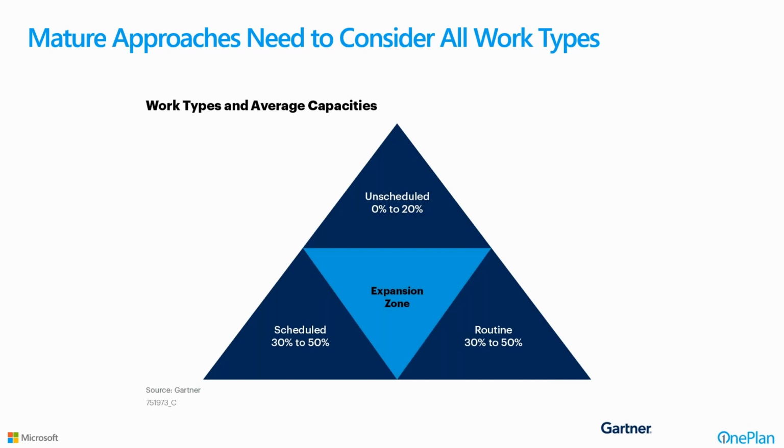And then there's the unplanned, the unscheduled, the things that come up that may be project or non-project related. These could all come together to take 100% of my bandwidth. And if I assume that I'm 80% available for projects or 100% available for projects, and I'm really not, the commitments that I'm making are fallacious.